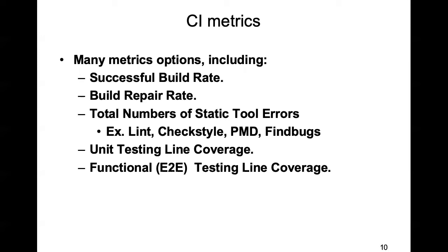And then whatever is causing the builds to fail, we need to identify what is the cause of it. Are people pushing untested code up to the GitHub repo? That would be a very simple example, but there might be other reasons as well. So we need to identify what's causing our builds to fail and try and resolve them.